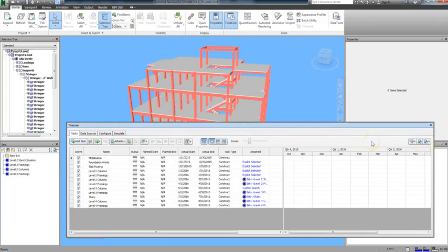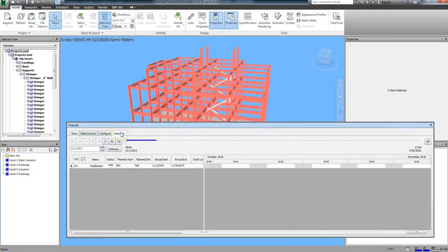In addition to exporting the raw data, you can also export an animation of your project over a course of time. Just go to the Simulate tab, and on the far right side of the window, you'll see an Export button. This will allow you to save your animation either as an AVI file or as a series of images.